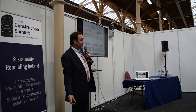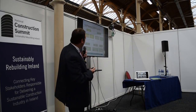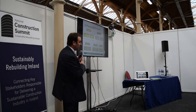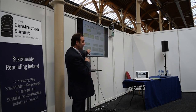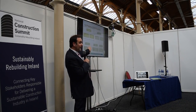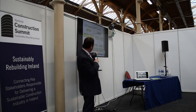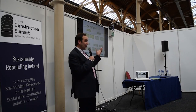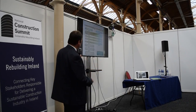So the old path you can see was LEED 2009. You had the fundamental and you had enhanced commissioning for 2 credits. Now there's actually fundamental plus 3 individual paths, which you can take all 3 or any one of the paths for commissioning. So you have enhanced commissioning. You have an additional monitoring-based commissioning to add an extra credit, and you can look at the envelope for the commissioning process for the envelope itself, and that'll give you another 2 credits, so a possibility of 6 credits.